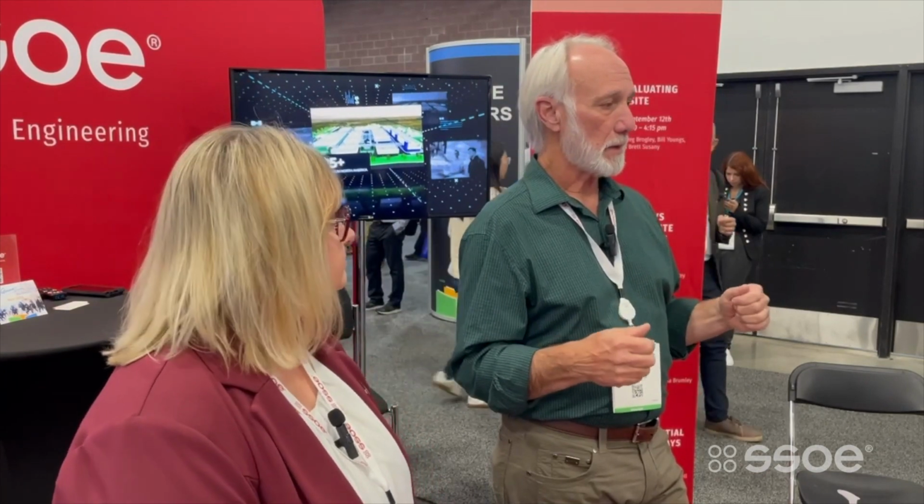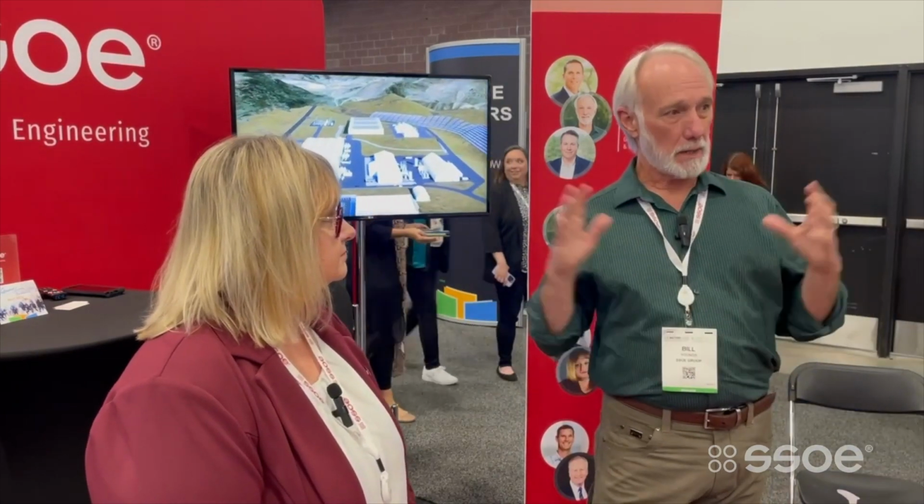In the construction world, they use a critical path, and they shake the thing out, and they follow that. And we're trying to do that on the design side. We do a lot of pull planning. We do a lot of charrettes. Probably the thing that we've worked with Panasonic that was most effective is we bring them into our own office in a great big conference room and hold everybody hostage, and we work on the whiteboards. And what we're doing is bringing in stakeholders and making key decisions, and saying, no, you don't get 2 weeks, you got 3 days.